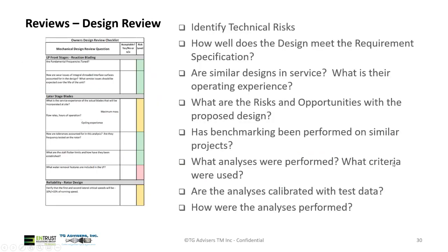So design reviews. What does a design review look like? This is a checklist from one of ours that we do internally just to give you an idea of the type of questions we ask. So the goal of a design review with the OEM is to sit down and have a detailed review. We like to send questions to them around the design criteria, things that are important, so that we can understand and vet any technical risks or project risks or potential changes that we see, or that we jointly agree are worth pursuing here. So how well are we meeting the design requirements we put out in the spec?